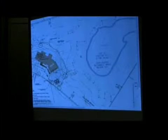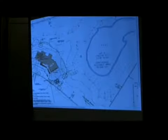A couple other things I didn't see on the plan: dewatering, to dewater the foundations during construction, and foundation drains. There may be a note on the detail sheets. I didn't see one, but I can check with the engineer. We did have drip trenches for the roof. That's their mitigation for roof drainage. There's a drip trench detail on the plan, a stockpiling note, and construction entrances, so a lot of the information you're usually looking for is there. Those were the things I noted were not.